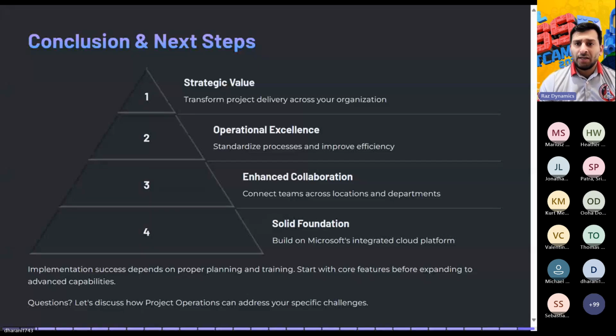So in short, Neil, field service still uses the Dynamics 365 model-driven app for scheduling, and you can, for example, schedule bookable resource bookings in field services, whereas in project ops, you are scheduling the resources via the work breakdown structure. So it is a slightly different concept, although they're both using unified resource scheduling as the mechanism, but they do work slightly differently.